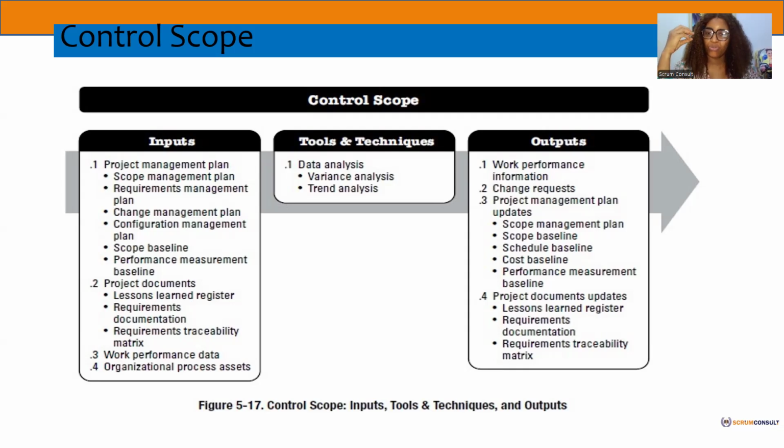In order for you to use that for decisions to predict future adjustments, okay, you can use that data or those predictions for your future impacts or your future outcome on the project. So that's what we have in trend analysis. Whereas the variance analysis is when you're trying to find out the difference between what you planned and what you got. Okay, the gap, what is the difference? You want to find that out, okay?